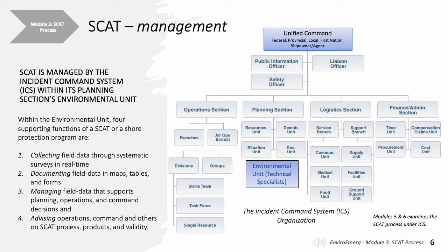This is a very dynamic and engaging unit to work within. Generally, you're working as a working group, but you're also working overall as a team. Your daily assignments will be developed by the SCAT coordinator, sent up the command chain through planning sections to unified command for approval, then packaged as part of the daily incident action plan.